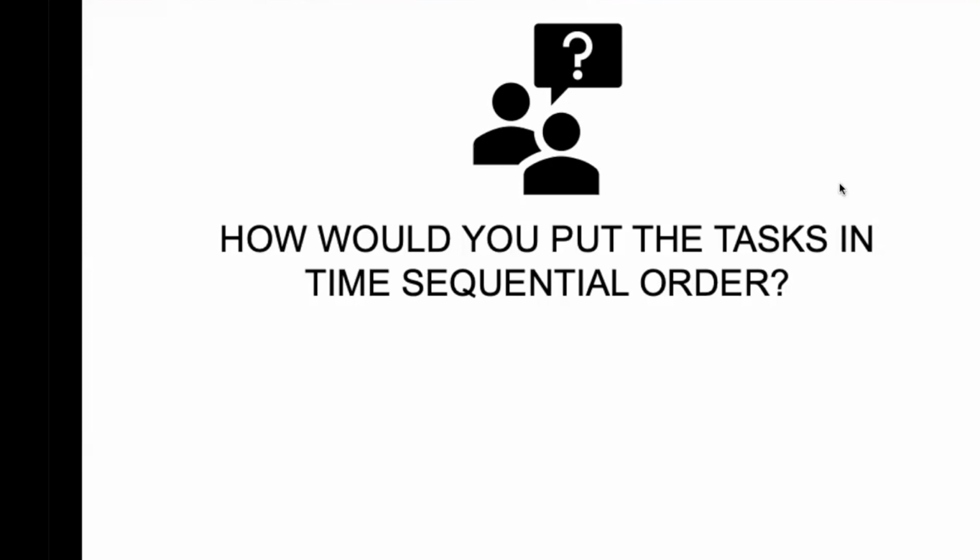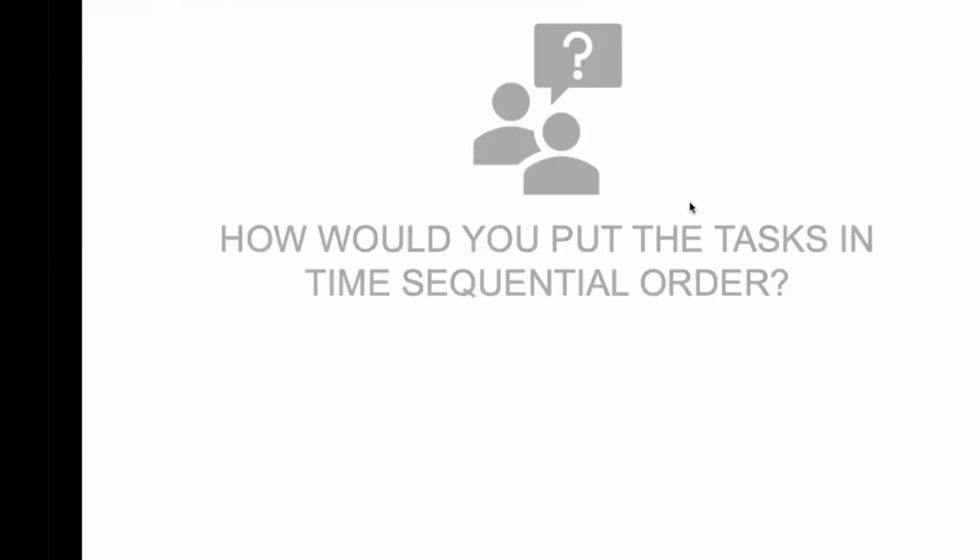So the project manager's work is never ending until it's accepted. I'm not saying delivered, because sometimes you deliver, but it's not accepted, right? That's why in the scope there is an acceptance criteria. If you go back to the slides, you'll probably see there's an acceptance criteria.